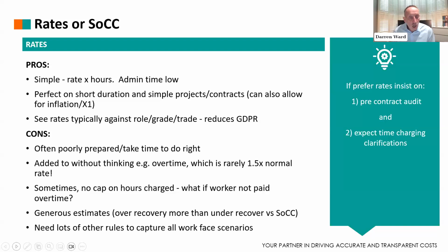But he's not paid overtime for the extra 4 hours. So if this individual was charged on a schedule of cost component basis, you would pay the lesser amount because the only charge and cost that day is the 8 hours at the £30.